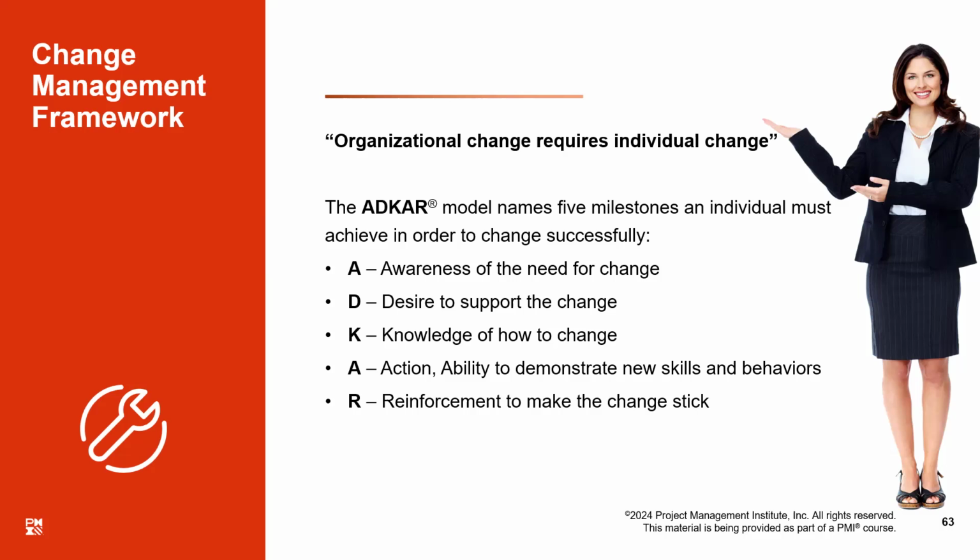Now, when we are done with the project, we hand over the product to whomsoever is going to take it over. But the problem is, there is one last step which we are missing out for change management. That is reinforcement, to make the change stick.